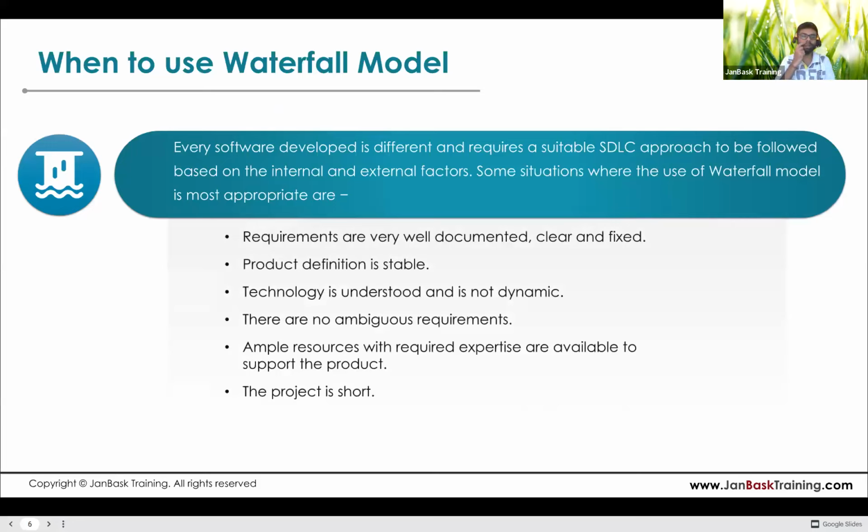If my requirements are well documented, clear, and fixed, if my product definition is stable, meaning the requirements, what you are going to develop, and what your product will look like are the same, then you can go ahead with the waterfall model, because there won't be any intermediary change, right?